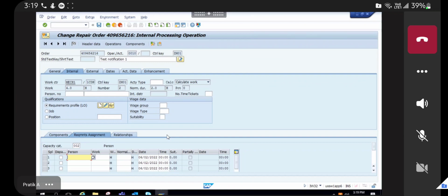If it is not approved but we are still entering the dates and the persons, there is a chance that the order gets rejected later on. So SAP will not restrict you from doing that, but in a general process way, it comes ideally after releasing the work order, once it is approved. Right, so there is the business perspective, but I asked for the system one. Right, the system will not restrict you.